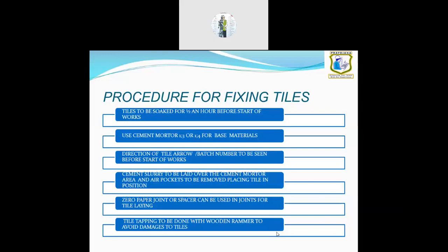For every house, they should keep at least 5 to 10 tiles extra, and 2-3 boxes extra. In this particular project, the engineers consumed whatever tile was there and did not keep any extra tiles. The new tiles available in the market do not match the color. So ultimately, for one tile damage, we have to remove the entire floor area of the room and redo it. Otherwise, the customer will not accept.